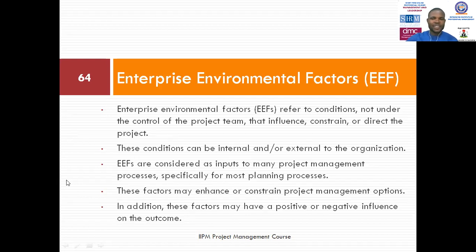With the PES2 analysis, we can now say, okay, political factors that can affect this project, we name them. Environmental factors that can affect this project, we name them. Social factors, technological factors, economic factors, we name them. So PES2: political, economic, social, technological, legal, and environmental.